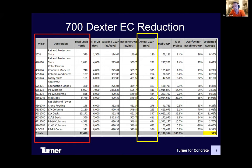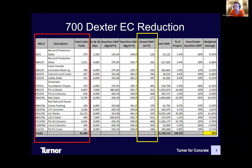We created a table that measures the embodied carbon of the chosen mix designs versus the NRMCA regional baselines. The items circled in red are the actual mix designs used, total cubic yards on the project, and the design strength. The item in yellow is the actual GWP of the mix design, which we got from the EPD of each mix used. The rest of the information is the baseline info from NRMCA and calculations. Really not a difficult process — it took us about 15 minutes. We found that by utilizing our preferred mix designs — again, without specifically targeting embodied carbon reduction — we were able to reduce the embodied carbon of our concrete by 39% against the NRMCA baseline. These mixes had zero impact on the project schedule. We did more cement replacement in vertical elements and foundations, less in the PT decks where we need early strength, offset by maturity sensors.